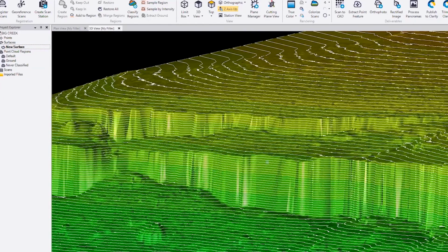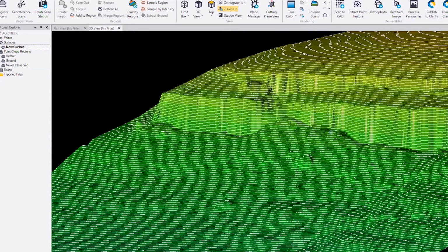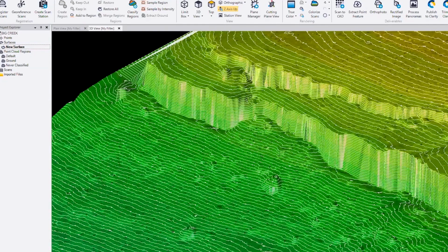Yeah, as we stated earlier, Jeff and I estimated that a 2-man crew would probably take 2 to 3 weeks to topo the entire area. Now, even if they were just to narrow it down to the corridor that Matt showed on his screen that we ended up actually flying, I think it would probably take a 2-man crew at least a full day, probably 8 to 10 hours of actual labor time, but the resulting set of contours and data would not be near as dense and possibly not as accurate. It might even take 2 days because it was all in timber.